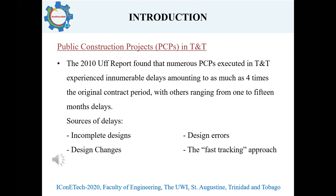These sources of delays were found to be incomplete designs, design errors, design changes, and the fast-tracking approach applied to the construction projects being executed.